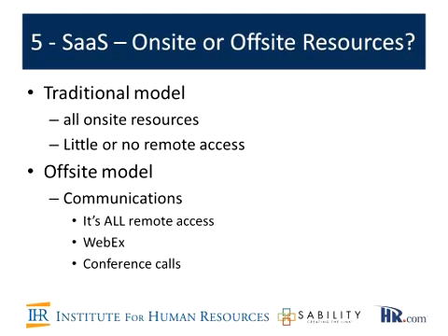Now there are times where it does make sense to have people on site, and from our experience, some of those times are during discovery, especially if you feel like your requirements are very complex. Sometimes there's nothing better than getting into a conference room and getting in front of a whiteboard and drawing it out, and that's the easiest way to understand. We've seen that some clients request it during parallel testing.